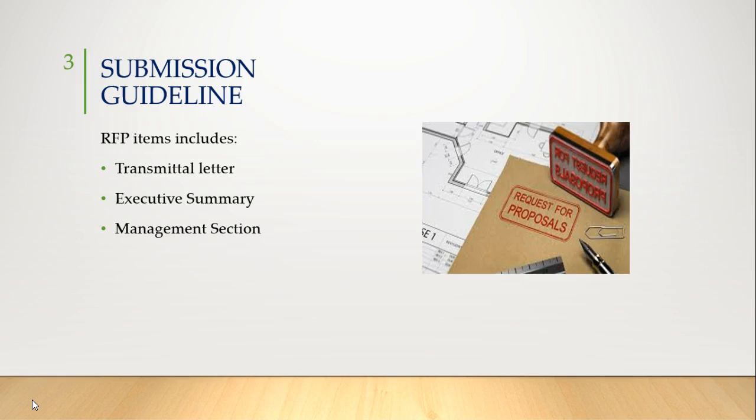If the supplier decides to include any type of graphics, they shall be focused on advancing the business case, of high quality and high resolution, and they shall include captions to explain how they are related to the text they are supporting. The management section shall include all staffing requirements, site preparations responsibility, delivery and installation schedule and plan, system acceptance test requirements, system training requirement, and documentation requirements.